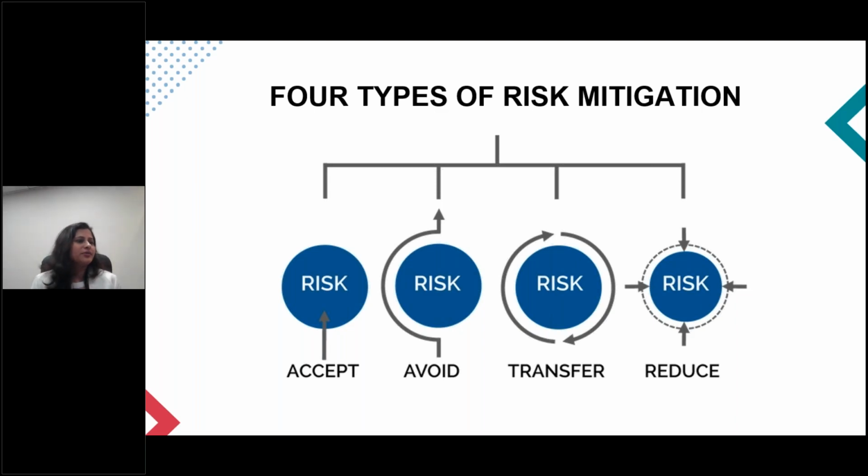Okay, while you think on that, I will continue. Avoid. You can, of course, avoid certain risks completely. It's a strategy. For example, you can have product testing to avoid the risk of failure of a product before the final production is actually done when you're looking at a new product. An example of avoidance of risk.